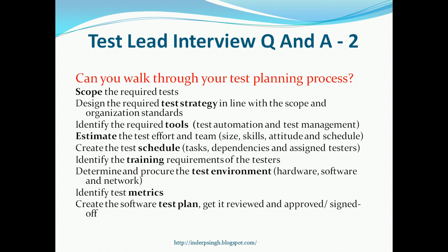Another responsibility is to create the software test plan document, which outlines the approach for the testing, how it is going to be performed, which roles in the team are going to perform which tasks, whether there are any assumptions, any constraints or any dependencies. So the overall approach for the entire testing based on the test strategy, effort estimate and the schedule is described in the test plan, and the testers in the team can go through the test plan and make sure they are totally in line with the entire test plan.